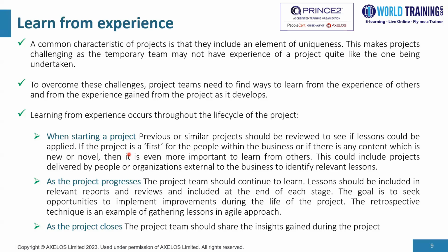Now, as the project progresses, the project team should continue to learn. Lessons should be included in relevant reports and reviews and included at the end of each stage. Now, the goal is to seek opportunities to implement improvements during the life of the project. The retrospective technique is an example of gathering lessons in an agile approach. Now, as we close the project, the team should share the insights gained during the project.